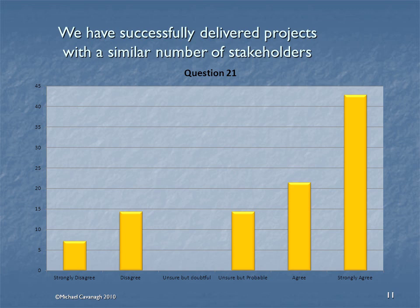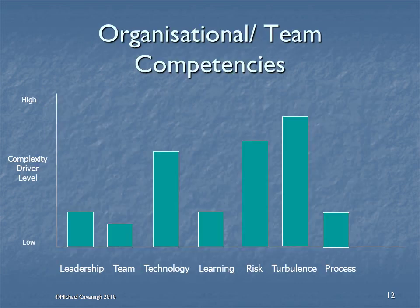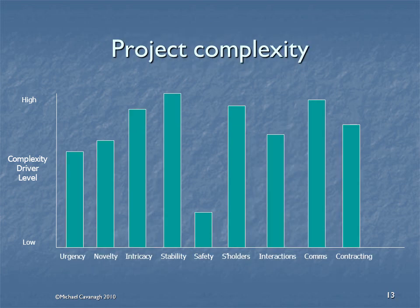As well as looking at the individual questions, we group those questions and give them a particular weighting to look at their contribution to the generalised complexity drivers — in terms of competencies and in terms of project specifics. We look at examples. This particular example shows that although the project isn't safety critical, it's highly intricate: there are lots of difficulties in stakeholder interactions, and we need to look both at internal communications and the contracting models.